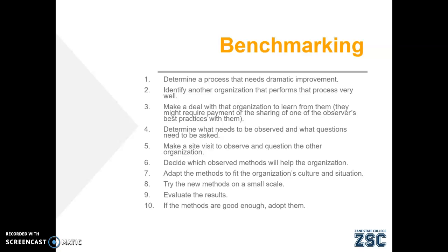Try out the new methods on a small scale and evaluate the results. If it doesn't work out for you, then that's just a lesson learned. But if it does result in good results, then you can adopt these methods and perhaps employ them on a larger scale.